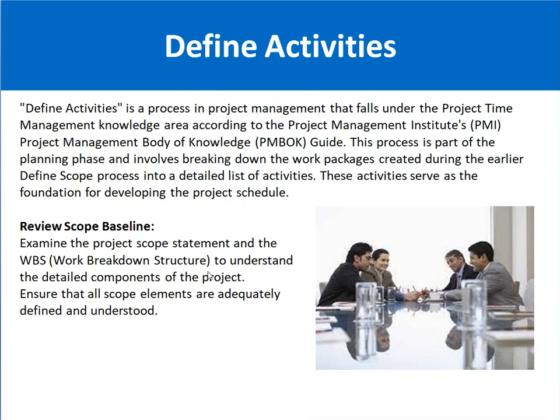That means we have to drill down and break down the project into smaller pieces so that we can estimate it, see what tasks are involved, and review it in detail. It is part of the planning phase and involves breaking down the work packages created during the earlier Define Scope process into a detailed list of activities. These activities serve as the foundation for developing the project schedule.